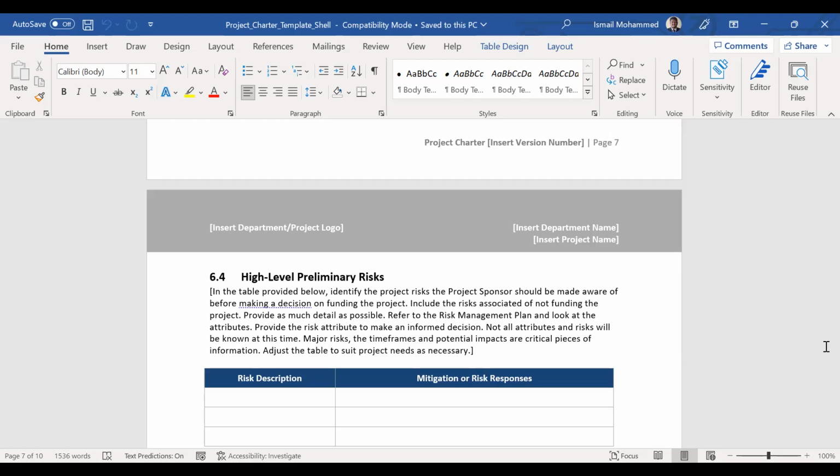So what you will do, you will put the requirements into the backlog. Okay, fine, I will deliver it, but first let me complete this. I will take the new requirements and put them into the product backlog. When you are executing a new sprint, you take from the product backlog and you will deliver it.